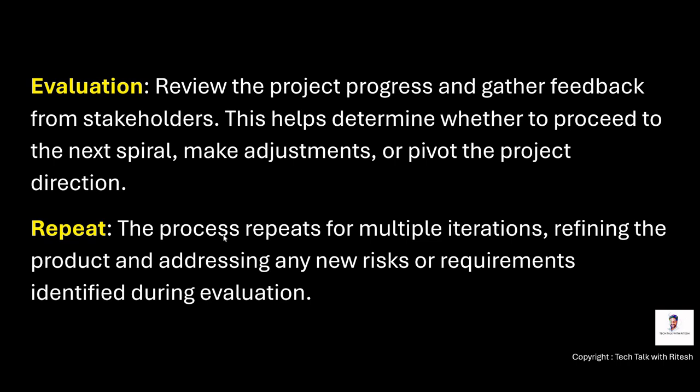Then evaluation: review the project progress and gather feedback from stakeholders. This helps determine whether to proceed to the next spiral, make adjustments or pivot the project direction. And repeat the process for multiple iterations, refining the product and addressing any new risk or requirements identified during evaluation. Since it's an iterative model, of course there will be a repetition.